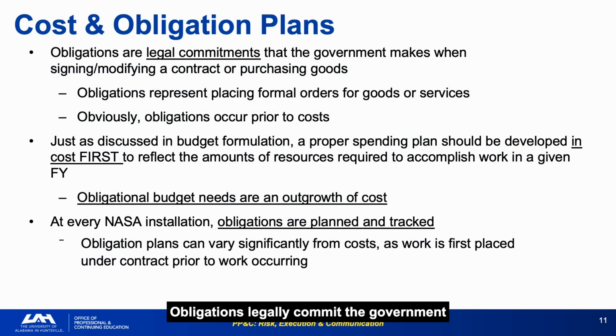Obligations legally commit the government to pay and must precede costs. Cost requirements should drive the obligation plan, not the reverse, and cost planning should be developed first against the work schedule. The instruction to develop the cost plan first before deriving the obligation plan is the sequence most analysts invert. They plan obligations because they are more visible in the financial system and then infer costs from them.